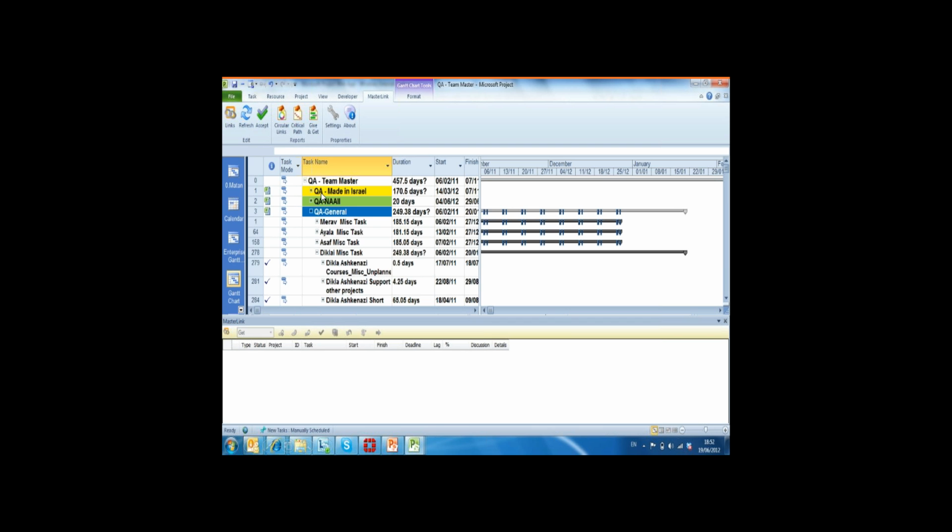And you can see here in this organization, we divided it by the names of the team managers. The naming convention is the name of the project manager, the team manager there. And here you can see it by the project. Okay, so if I go in here to see QA, these are all inserted project plans. So I can see, as the team manager, all of the tasks that my team is supposed to be working on, and if I have over or under allocations of resources, I can work on it from this file.